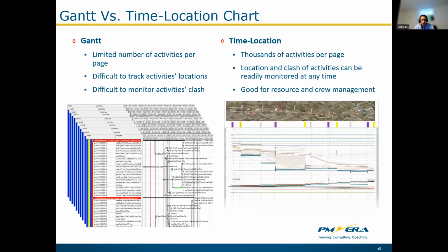Whereas in the time location charts, we can display thousands of activities on a single page. And also the locations and clash of the activities can be easily tracked and monitored. And the time location chart is also good for resource and crew management.